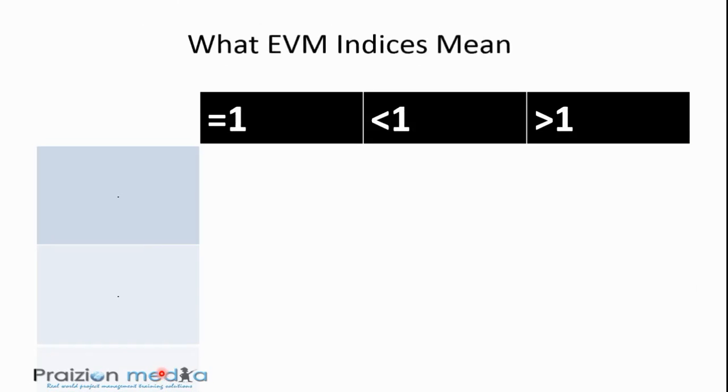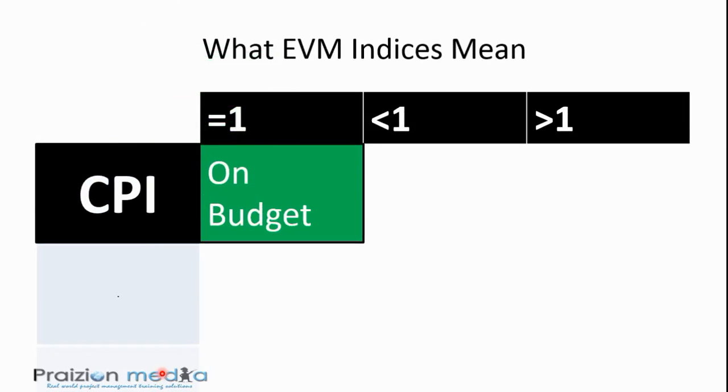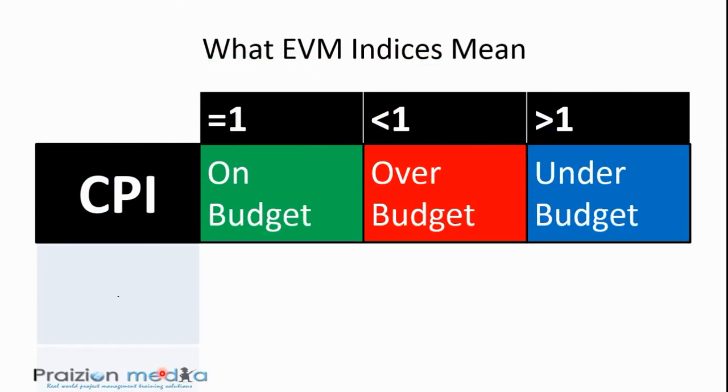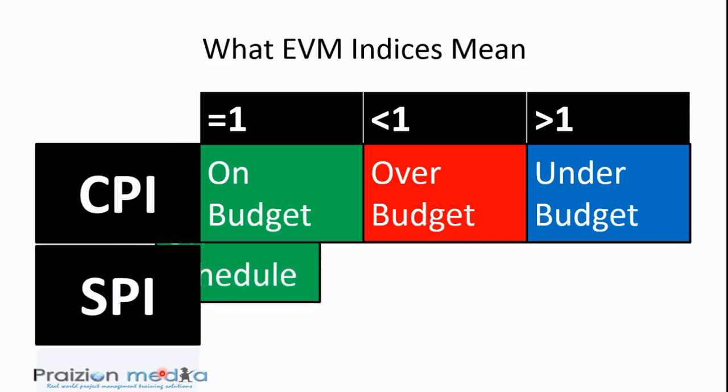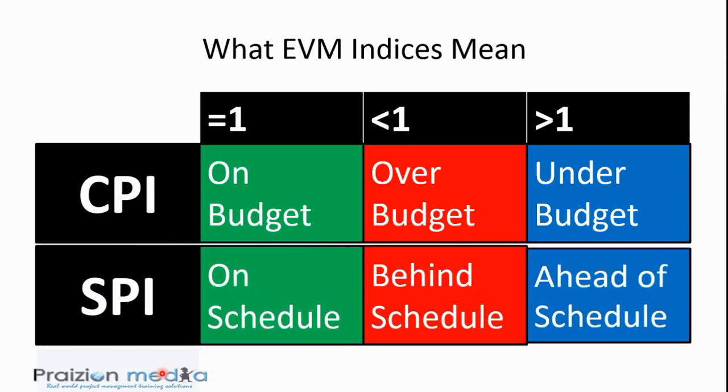Now, in the case of the indices, we take a look at cost performance index, equal to 1, right on budget, less than 1, over budget, and greater than 1, under budget. If you look at schedule performance index, equal to 1, on schedule, less than 1, behind schedule, and greater than 1, ahead of schedule. Again, the direction of these could be looked at as arrows. They map directly to that for schedule performance index, but for cost performance index, it seems to be skewed the other way around. So, just bear that in mind.